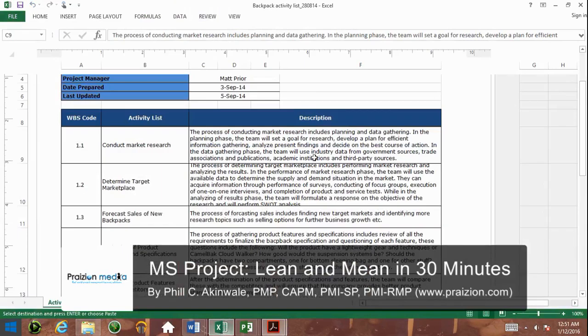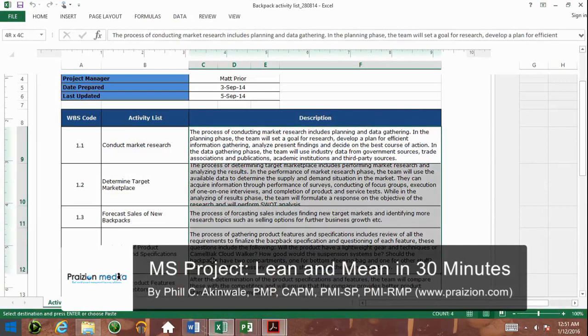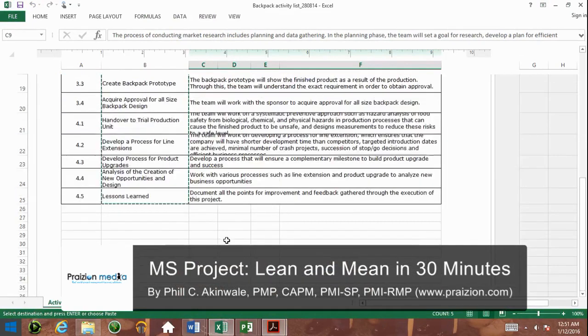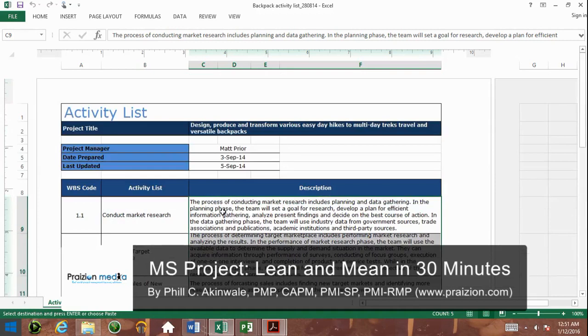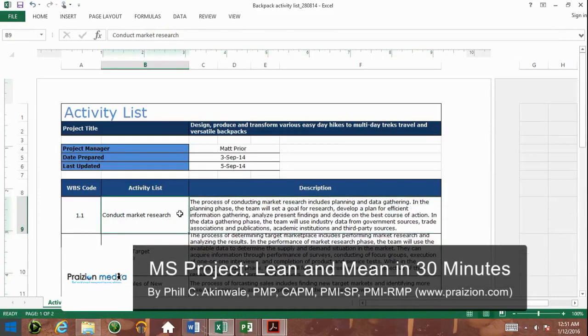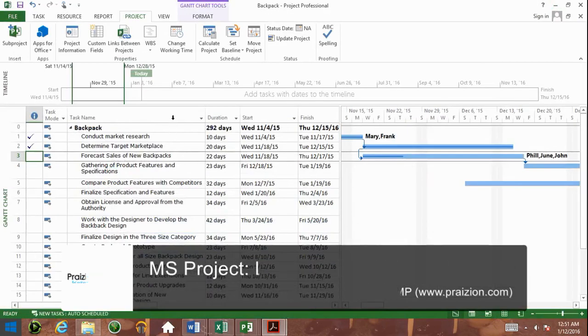That was our activity list, and it defines all of these activities in a lot of detail. Not that this needs to be the case in an activity list, but it would be good practice to really understand what the activity entails and to have the people who are carrying out the work actually describe and define the duration. So anyway, we've got define activities, putting all this in.